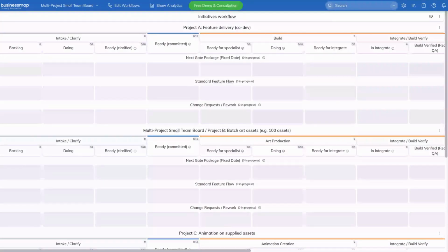Going back to the session we had on part 2, I can also use this to mark aged cards. If I've got cards which have been aged for too long, it will show on here. One of the priorities, right, that you look for is how old a card is. I can also look at the number of days before a deadline, and I can raise that as an alert so that it will mark a card and say, this card is now 5 days or 10 days before the deadline, so it needs to be prioritized.